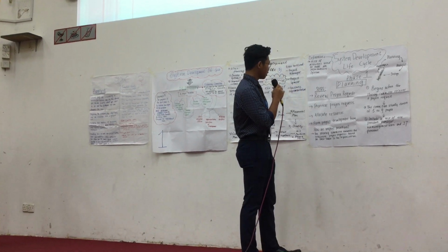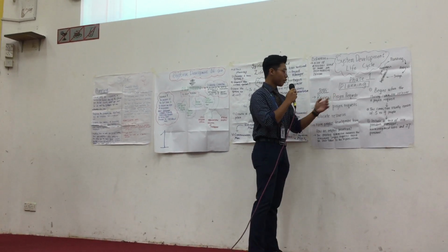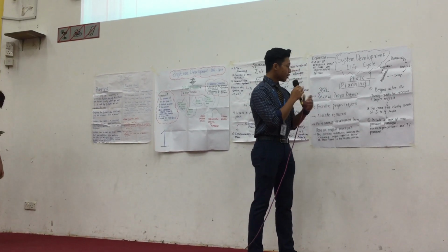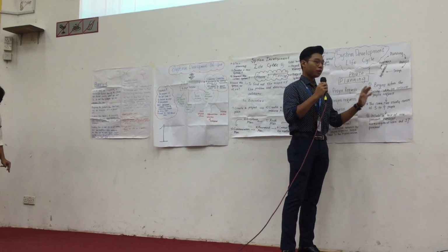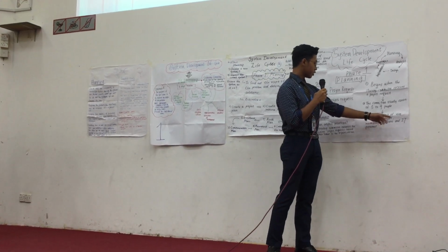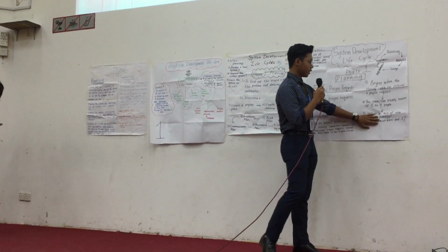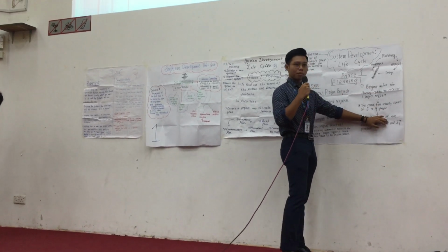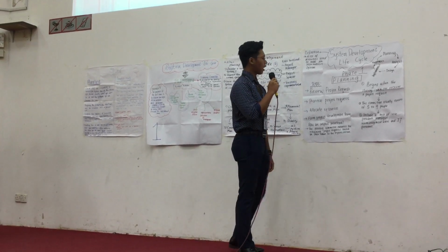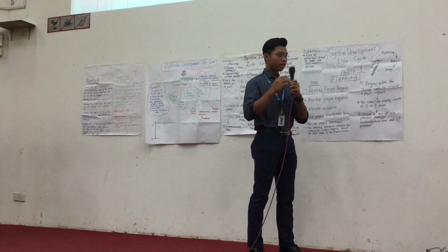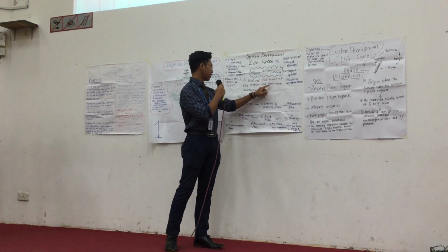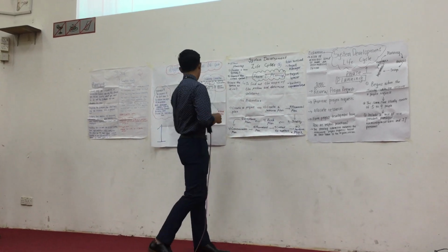The steps of planning usually start with review project requests, which begins with the steering committee receiving a project request. This committee usually consists of 5 to 9 people, including a mix of vice president, managers, non-management users, and IT personnel. This team usually gets requests from people about how the problem arises, then in planning, we have to scope the problem and determine the solutions of the problem.